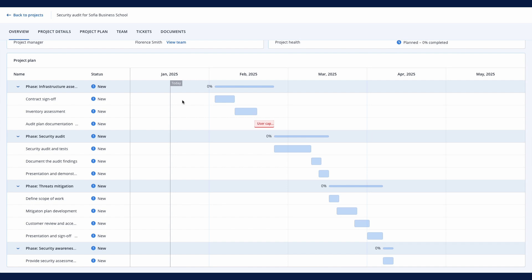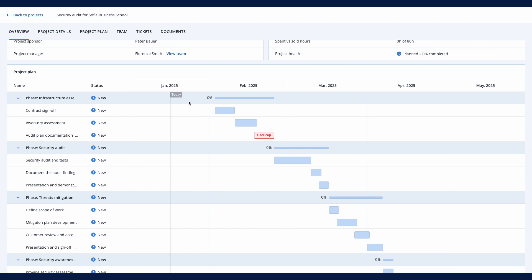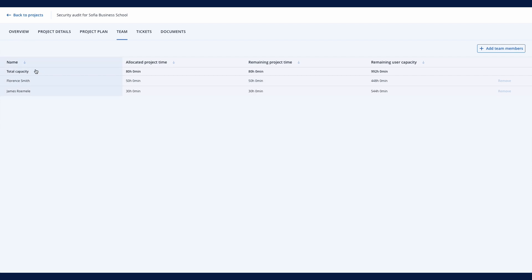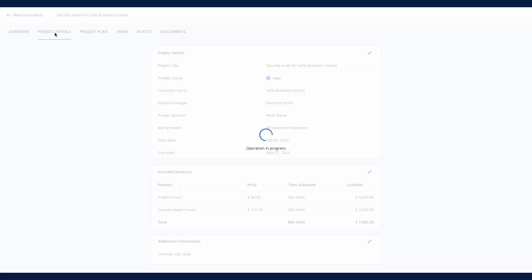For each project member, the system calculates available time, considering other commitments such as service desk tickets, other projects, registered PTO days and sick leaves, and flags risk with clear descriptions. With Acronis PSA, you have full control over your project budget and delivery.